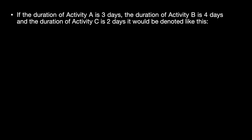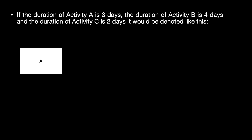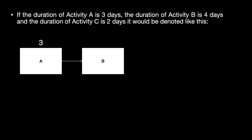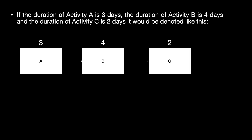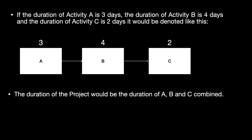Now let's add durations to this diagram. If we had activity A with a duration of three days, activity B with a duration of four days, and activity C with a duration of two days, it'll look something like this. So the duration of the project would be the duration of activity A, activity B, and activity C combined — three plus four plus two — which is equal to nine.